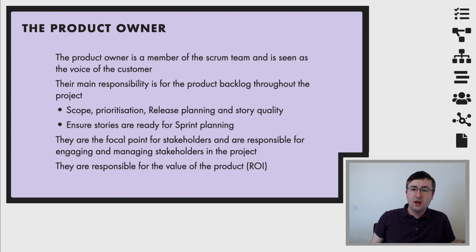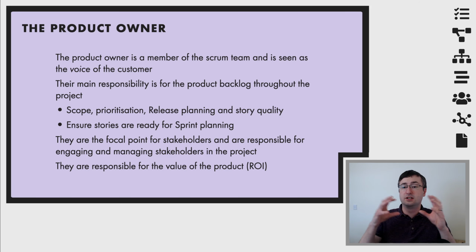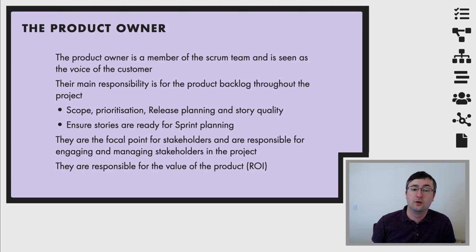So within a Scrum team, the product owner is really seen as the voice of a customer. It can be beneficial to have the customer on site all the time. However, the challenge with that is that the customer is also having to put aside additional time, money, and effort to be made available. The alternative to this is to have a product owner on site that acts as the voice of the customer, and they're really there as the only way that you are communicating as a Scrum team with the client. They're there to be that single point of contact.